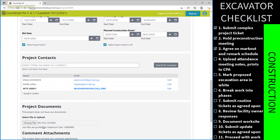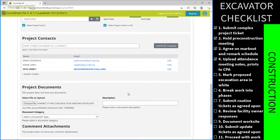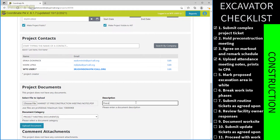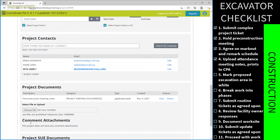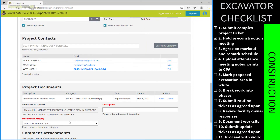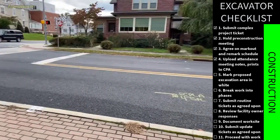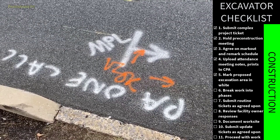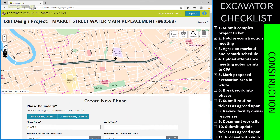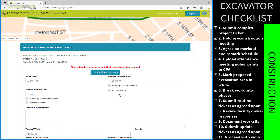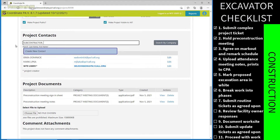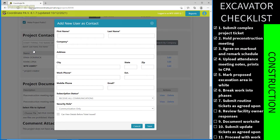After the meeting, it is important to upload meeting notes and attendance into CPA so all parties can access them. With planning and agreements complete, the excavator is almost ready to submit routine notifications — the ones that allow excavation to begin between 3 and 10 business days after submitting. In the days between placing the ticket and the lawful start date, facility owners will dispatch their locators to mark lines at the work site. It is important to mark the work site in white paint or flags so that the locators know where to mark their lines.